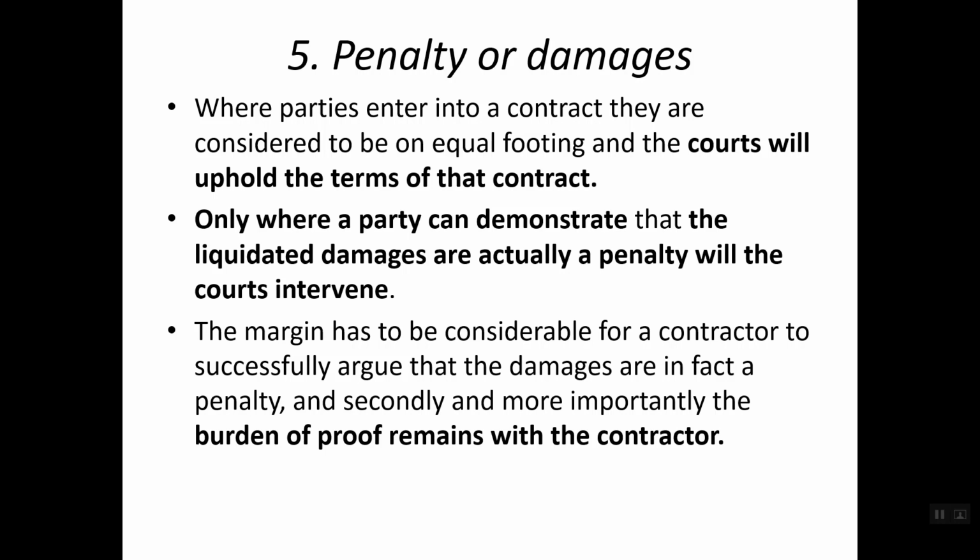Only where the party can demonstrate, with the court's intervention, that the liquidated damages are actually a penalty can this change. The court cannot change our conditions as per its wish, but it can change the condition if the damage can be proved to be a penalty. So the burden of proof remains with the contractor.